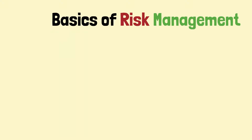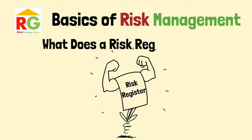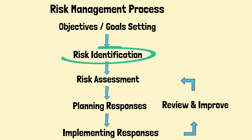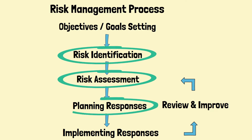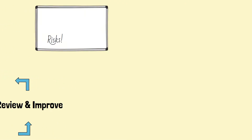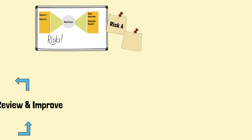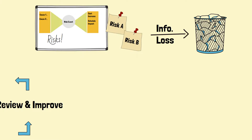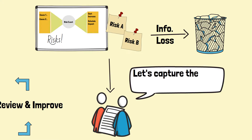This Basics of Risk Management series is brought to you by Risk Garage. What does a risk register do? In the risk management process, a lot of information is gathered from risk identification, risk assessment, and risk response planning. The risk information is sometimes scribbled on whiteboard or paper, and could be lost if it is not kept in a structured manner. Therefore, the risk register plays a very critical role in capturing and managing the risk information.